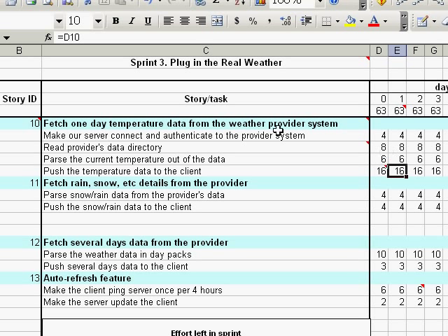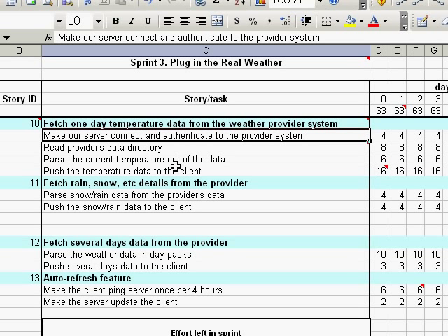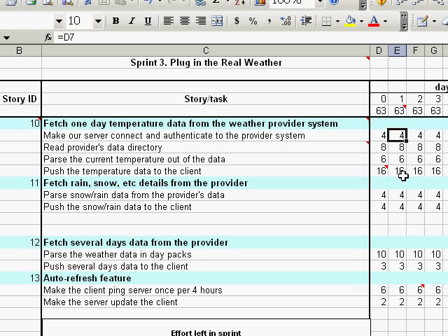Let's suppose that after the team started working on the very first task on connecting to the remote server, it figured out that the data provider legacy protocol is far more complex than was expected. As a result, the estimation of work left can actually go up even though some work has been done already.